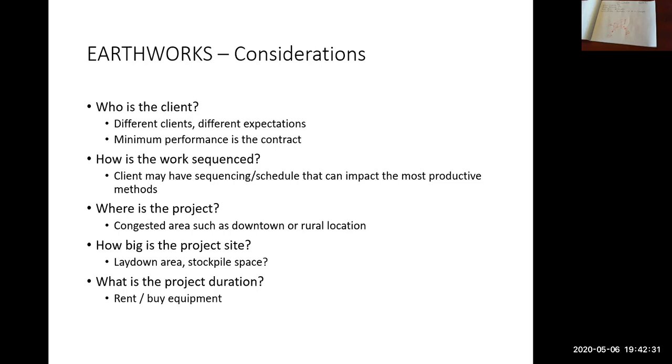It impacts things like how quickly you can get gravel, how quickly you can dispose of spoil. So your dump truck loaded with the excavation has to drive, is it an hour to the dump site or is it 3 hours? Because of things like traffic. Do they have to stop at stoplights every 30 seconds? So the location of the job is very important.